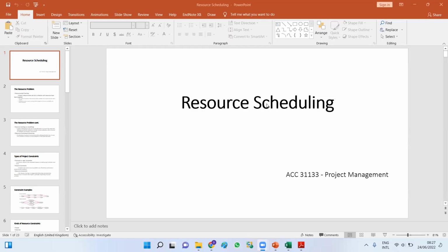they can actually give some time values regarding pessimistic, optimistic, as well as the medium. So A, M, B can be given. They will be given 3 time values: most pessimistic, optimistic, and most likely time.